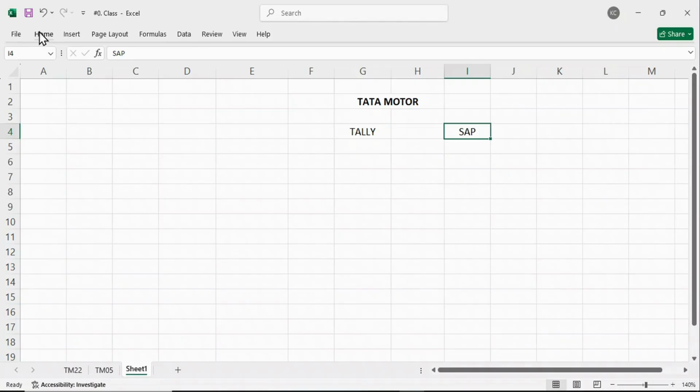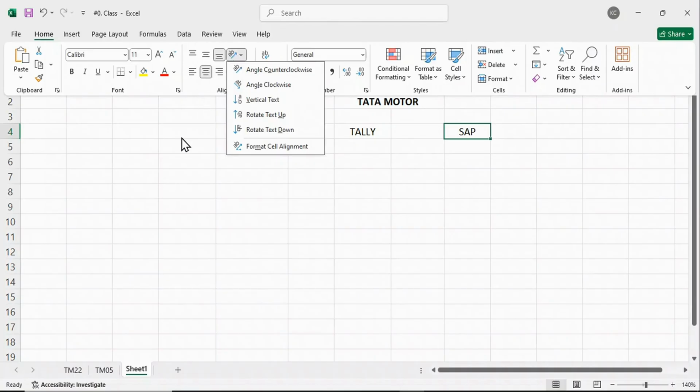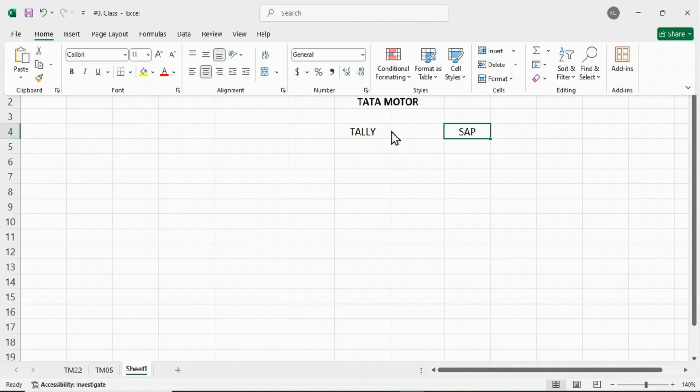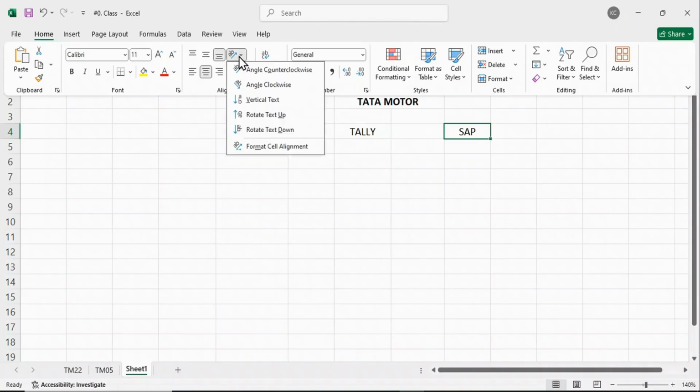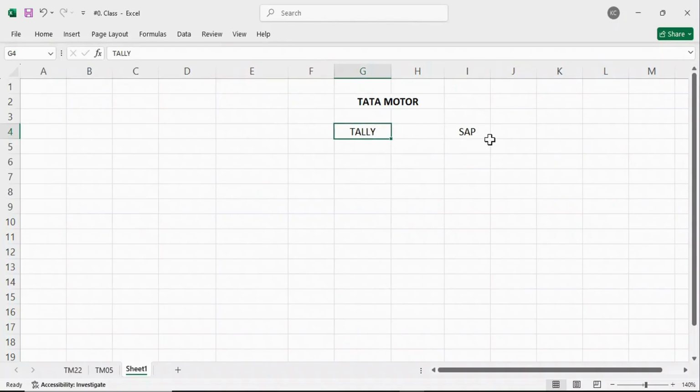So generally, guys, in that case we have to migrate the data. From where? From this legacy system to the SAP system. So we have to migrate the data from the legacy system to the SAP system, and this is called data migration, right? This data migration activity itself is called cut over activity, guys. So if anybody asks, what do you mean by cut over activity? Simply you have to say cut over activity is a data migration activity where the data will be migrated from where to where? From legacy system to SAP system.